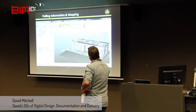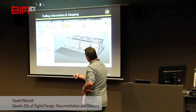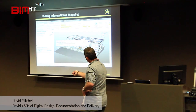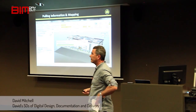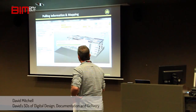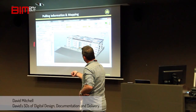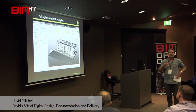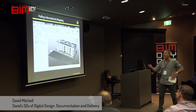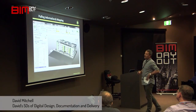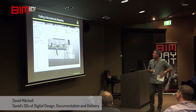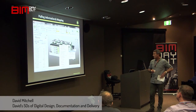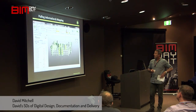We can isolate areas, and then the next phase is we start to import quantities and you'll see quantity information come in here. It comes in by element, or sometimes what's referred to as QSID. The reason it comes in in this form is because we've mapped it to come in that way — there's no coding driving this, it's actually a map. We can see that those precast panels are 2,186 square metres and we can see where they are, so we can start to verify our measurement.